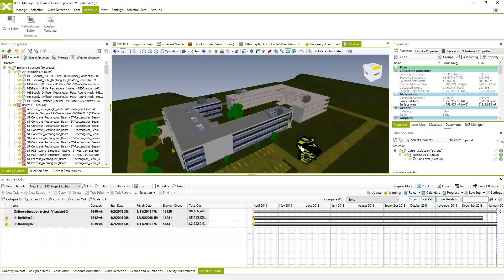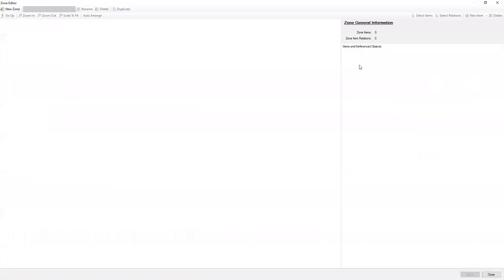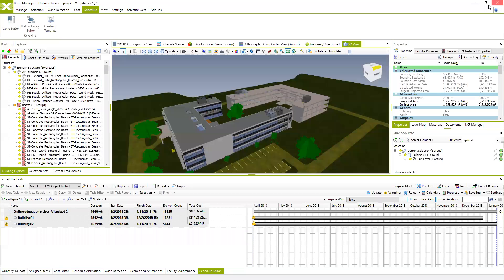Our system tries to create an optimized schedule like an assembly line. For this kind of scheduling method, we use methodologies and zones. Zones and methodologies are the main tools for creating and defining our scheduling methods. These tools are positioned in the upper part of the window, and you can find them within the Schedule tab. You can see the Zone Editor, which is currently empty, and the Methodology Editor, which is also currently empty. We can create creation templates mixing these two tools in order to create the entire schedule.